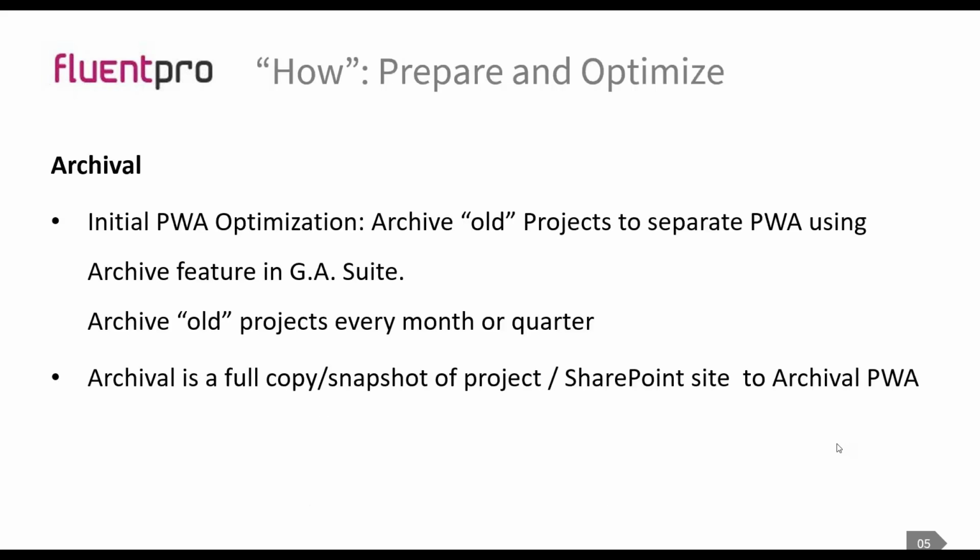Like all the data for all the backups are written to a specific database that is hosted in Microsoft Azure. What we recommend to start is to prepare your PWA and optimize it. And we recommend customers to do it with some frequency, like monthly, quarterly. And we call this process archival. So our recommendation is to provision the separate PWA. It's an archival PWA. And from time to time, move completed projects or old projects to that PWA.